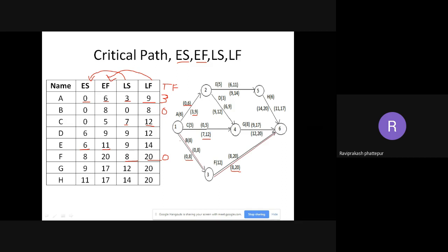We have found out the critical path, the duration, ES, EF, LS, and LF. These were the only things asked. So what was the procedure? First, check what is given. In this case, activity nodes were given, so draw the network diagram. Then mention the activities, write the duration, then go with the forward pass, then the backward pass. Then find out the critical path and the duration, and you can write the ES, EF, LS, and LF by seeing that network diagram.